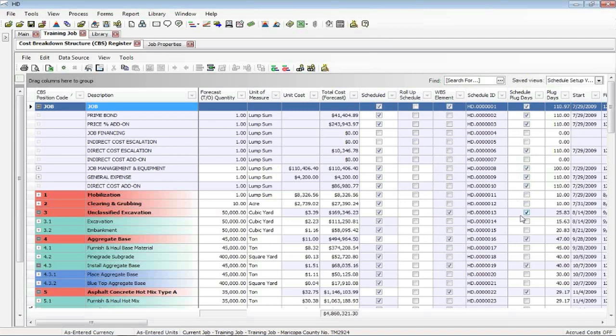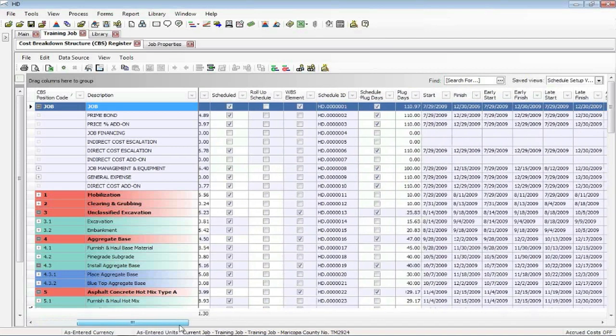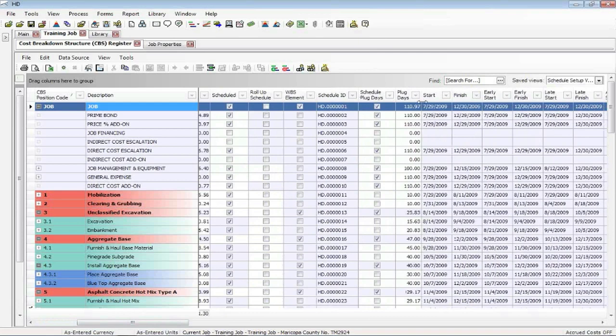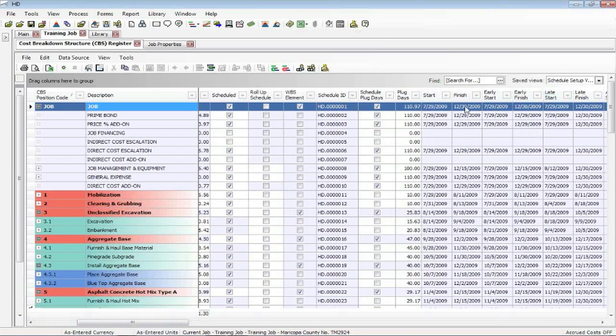Now we do bring back some data from project. There's really only two kinds of data we will bring back. One will be the start and finish dates, those six dates. I'll scroll over here so you can see them. We will bring back these dates from the schedule once you've made your connections and your logic links in the schedule.